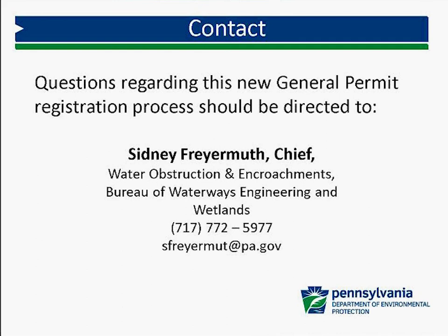Page 4 of the GP form includes the first page of the Aquatic Resource Impact Table. Is this supposed to be replaced by the completed table or left blank in the GP form? The Aquatic Resource Impact Table in the GP registration form is meant to be an example. You will have to download the Aquatic Resource Impact Table separately and insert it on page 4 to be submitted with your GP registration.